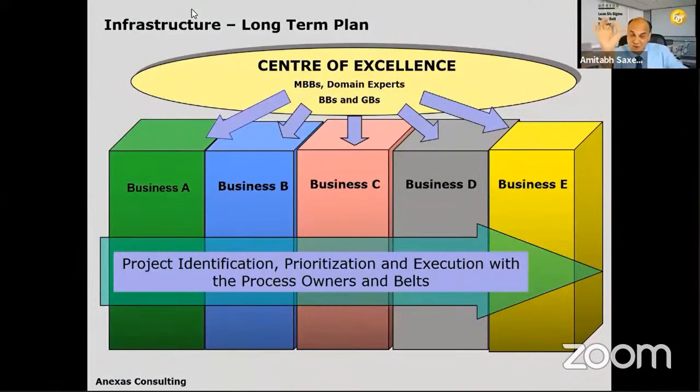And with a proper goal statement, a SMART goal statement: today, my defect level is at 2%. I would like to reduce it to 0.05%. It's a project. I would do it in 3 months, 5 months. We choose projects from different domains. And then we assign these projects to green belts and black belts. And how is it done?